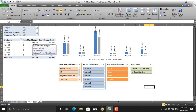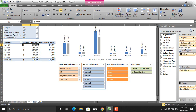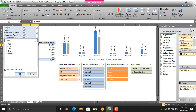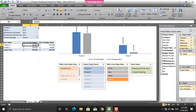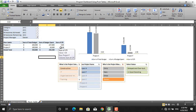Next, I'll remove these filters. I'll take the project manager name to the report filter, select the name Stephen, and click OK — the projects managed by Stephen will be shown. The project financial status is not limited only to total budget and budget spent; there might be other things to see. For example, I want to see the CPI, so I'll drag CPI here — and there are all the CPI values for Stephen's projects.